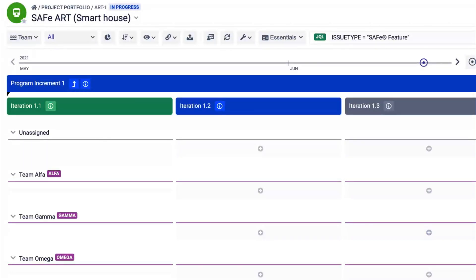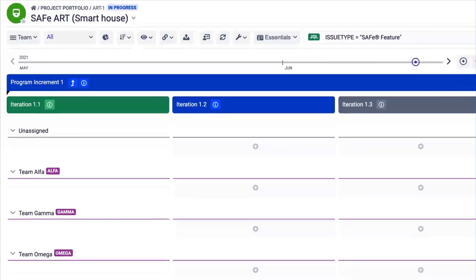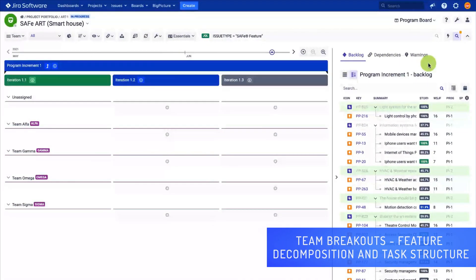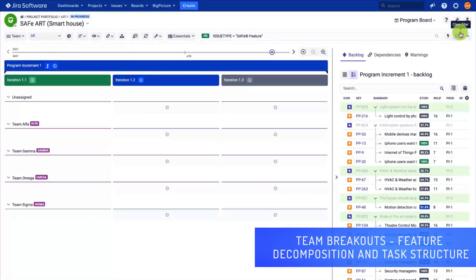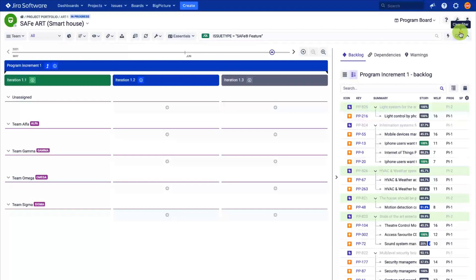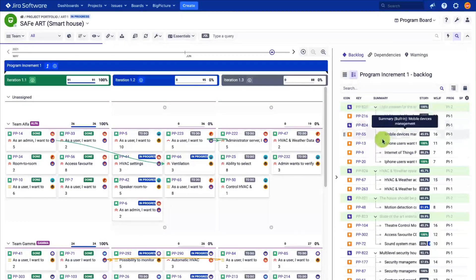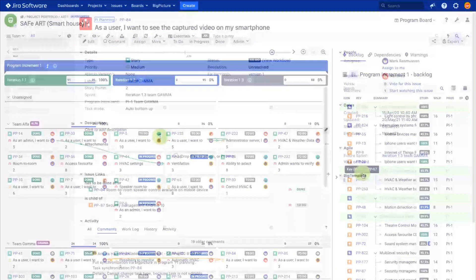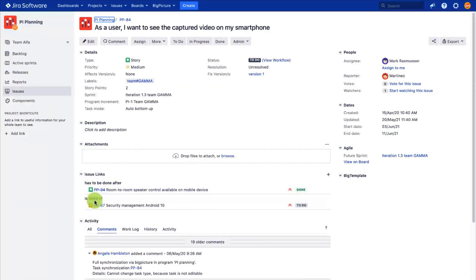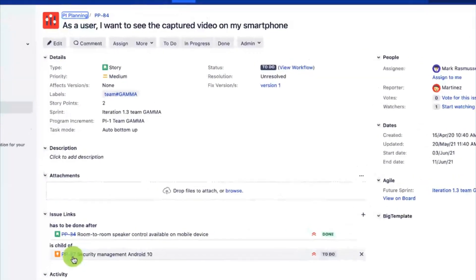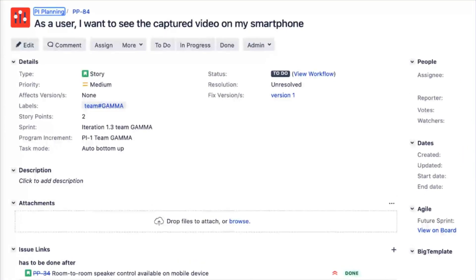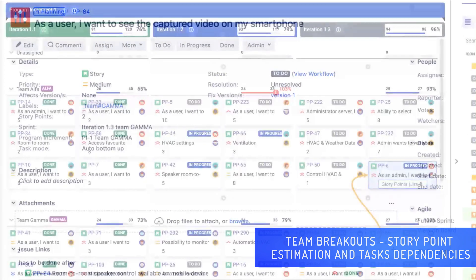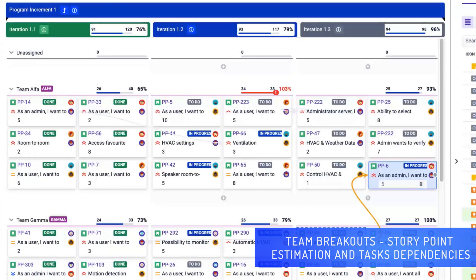There are a couple of tasks for the teams at this point to plan the iterations. One: decompose the features into stories. As I have already used the epic link to do that, I'm using a custom link type which I named parent-to-child. This means that I need to link the stories to the related feature. Alternatively, you can rename the epics to features and create an issue type epic to group the features.